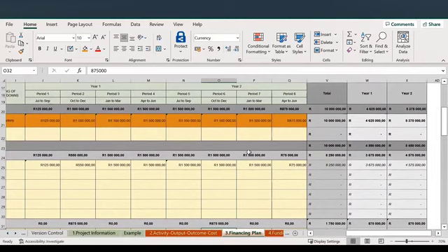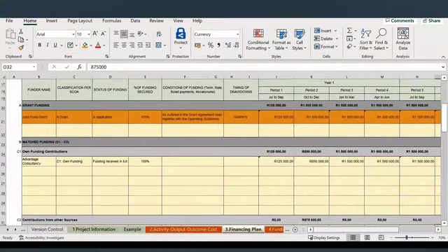Ideally, of course, you have match funders that are contributing funding in the manner that they're contributing. Outside of match funders having a set time, how they pay, and set conditions for how you draw down from them, we recommend that your drawdown, so your income, is closely aligned to the expenditure that you require.